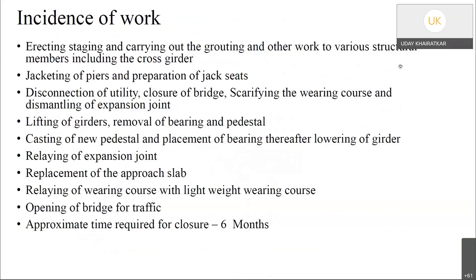Various structural members, jacketing of piers and preparation of jack seats, disconnection of utility, closure of bridge, actually we had suggested complete closure of the bridge, scarifying the bearing ports and dismantling of expansion joints, lifting of girders, removal of bearing and pedestals, casting of new pedestal and placement of bearings, thereafter lowering of girder, relaying of expansion joints, the replacement of approach slab, relaying of bearing ports with lightweight bearing ports. Opening of bridge for traffic. Approximate time required for the entire rehabilitation was around 6 months.